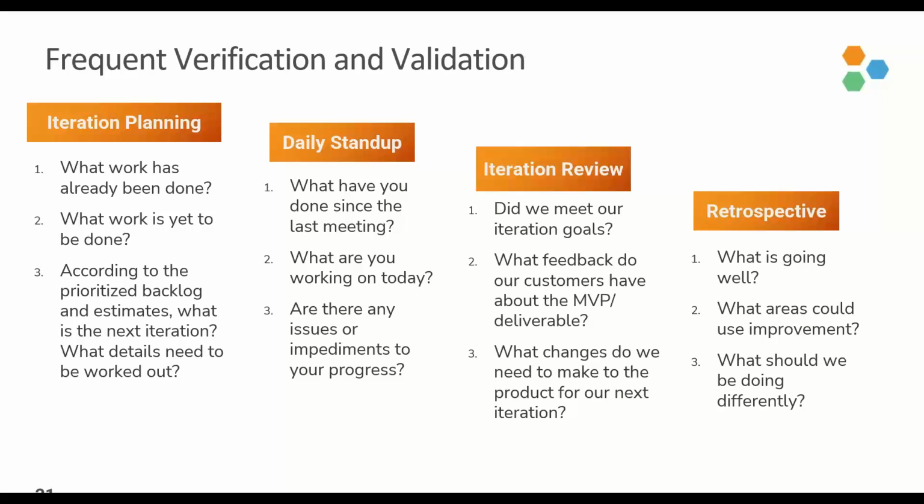So for example, let's start with the iteration planning meeting. This happens before each iteration. Iterations are that time-boxed cycle of development. And in this meeting, further details for that upcoming iteration are worked out, and details already documented are just verified right before we go into the iteration.